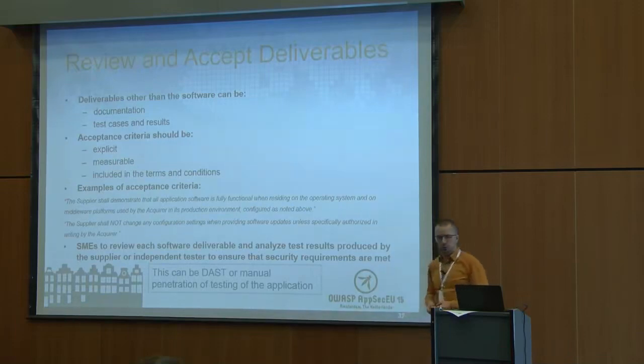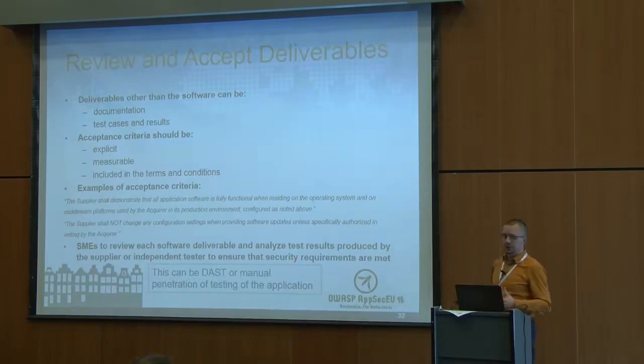There's also information that, in this example at least, the supplier should not modify any configuration settings when there is an update, as part of the change control, unless it's authorized by the acquirer. And the subject matter experts should review the deliverables and look at the test results which have been provided by the supplier. The tests can also be done by third-party testers, and they probably should include both static testing and dynamic analysis or penetration testing.